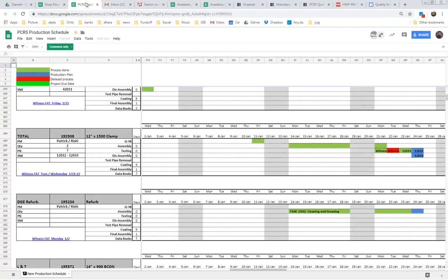Based on the CRR, the parts are going to come first week in February, all of them. They'll come to you and say, do you want to start building? I have capacity, or I cannot build it by the second week of February, can you move it? Those communications happen with the PM. So your schedule and those CRR become an important part in planning what goes on in the shop, and that transpires into the daily production schedule.